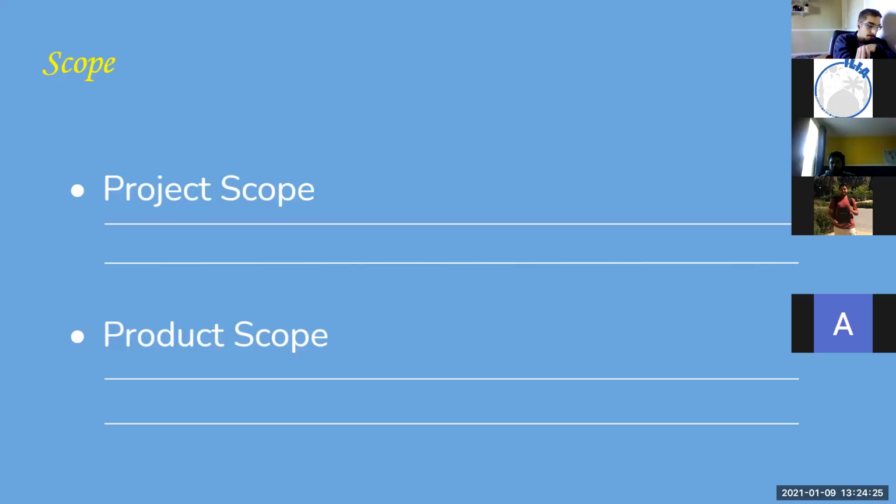The project scope usually gets defined by the project manager, where the product scope is defined by the product manager. And the two need to sit down throughout the project and communicate clearly so that they're on the same wavelength. Because at some point, the product manager could come back and say, let's take feature number 7 out because it's going to delay things, it's too complicated and the return on investment is not that big. So the project manager does a scope change and maybe reduces the budget or shortens the cycle of the project. There could be some impact to the project scope as well, and vice versa.